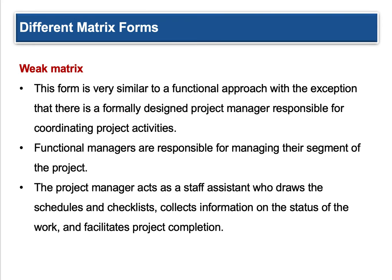There are three forms of matrix. A weak matrix is very similar to the functional approach, with the exception that a formally designated project manager is responsible for coordinating activities. So if the functional approach distributes the project across the existing organization, a weak matrix adds a project manager who is the champion and drives it.